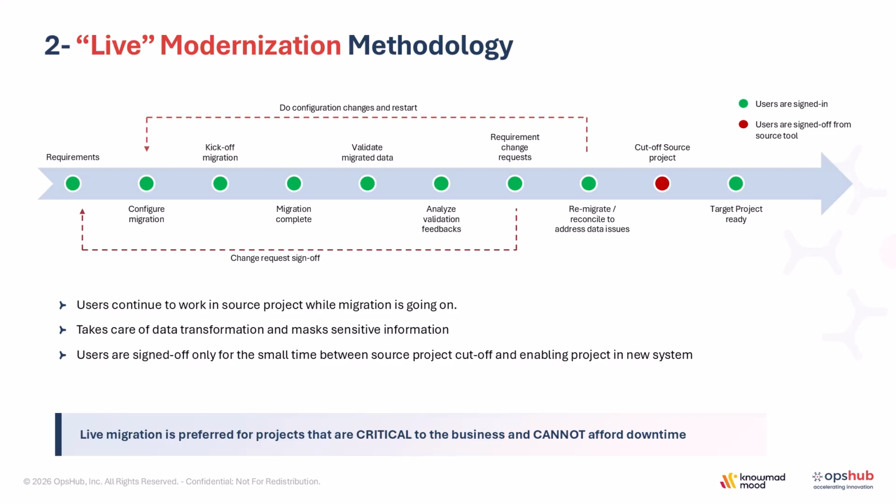And furthermore, at the last minute, a team can choose to say, look, there's a critical release or some critical event has happened and we can't migrate this weekend. So we can move and change the migration cutover time even at the last minute. So it gives a lot more flexibility. And when you're talking about a large number of teams, these exceptional things actually become fairly routine and they are guaranteed to happen.